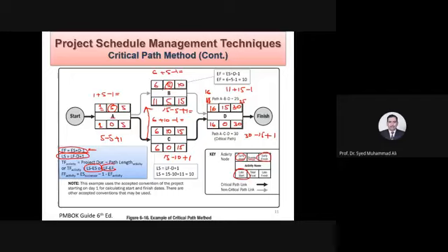And by the way, there is a terminology we will discuss very shortly, called the baseline. Your software has the option to save the baseline. When we plan this, when all of us sign on this and approve this project, it gets stored and marked, it becomes a writing on the wall, frozen. It becomes the baseline. Now everything will be measured according to that.